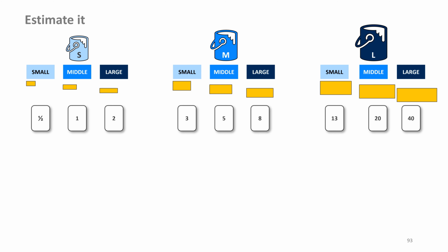This is determined over several sprints, and later you can say, my team manages 100 story points per sprint. This allows us to predict the number of sprints to work our way up to a specific backlog item. This allows us to plan over a long period of time.